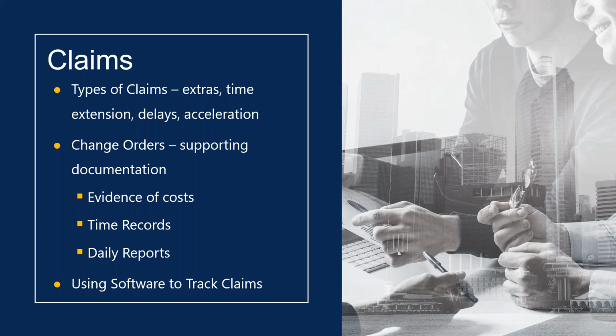So you need to check your contract on how you go about submitting those claims. And the critical thing, this is about document management. You got to have the documents that are there to support that claim. Okay? If you can't show by daily reports, by labor reports, when people were working and how they were working, then good luck getting paid on that.